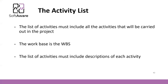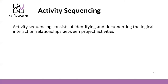Of course, we have to put this on a schedule. But first, let's build the activity sequencing. Activity sequencing consists of identifying and documenting the logical interaction relationships between the project activities. This means that there are relations between the activities and the tasks — sometimes you cannot do something before doing something else. You cannot drink water from a glass if you don't put water in the glass first. So there is a precedence in these tasks.